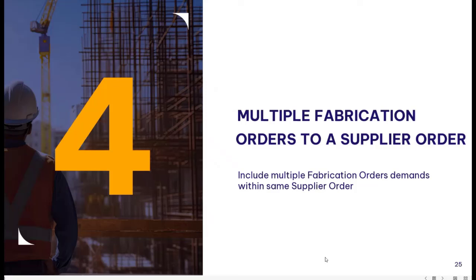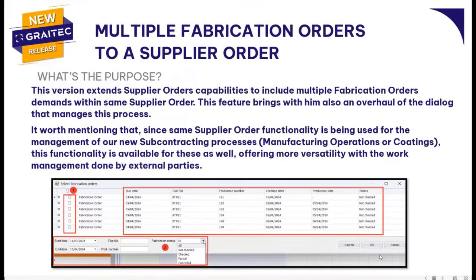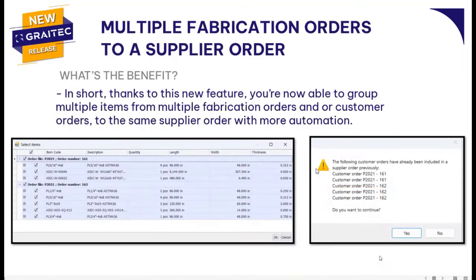Next, we'll take a look at grouping multiple fabrication orders to a single supplier order. The purpose of this feature is to enable Advanced Workshop Steel users to not only group one fabrication order at a time to a supplier order — now, once nesting has been done on multiple fabrication orders, you can choose to separate your supplier orders per project, or compile multiple nests from different fabrication orders into one single supplier order. The benefit is to save time and not bombard your suppliers with many different supplier orders.